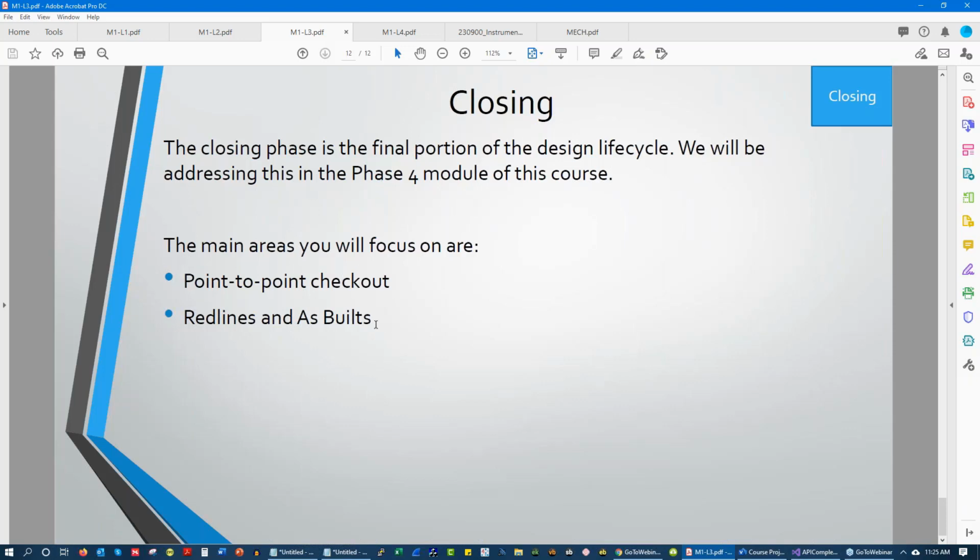And when someone does end up contacting you, how you protect yourself is having an accurate as-built submittal deck, because that is going to be the reference point for all challenges.